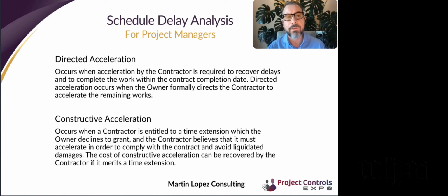Now, we also have what is called constructive acceleration, which is a different situation. In a constructive acceleration situation, what happens is typically a contractor is entitled to a time extension through issues of delay, but the owner declines to grant a time extension, and the contractor feels that they are in trouble, and then the contractor accelerates the project so that they can finish on time.